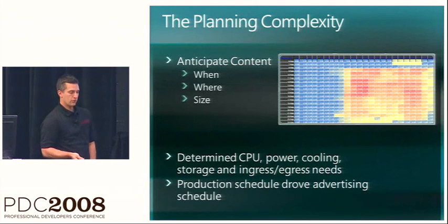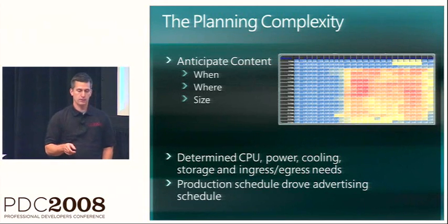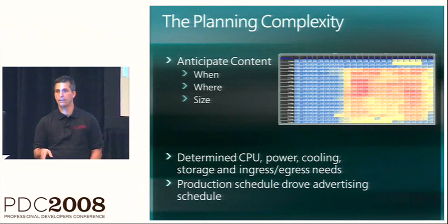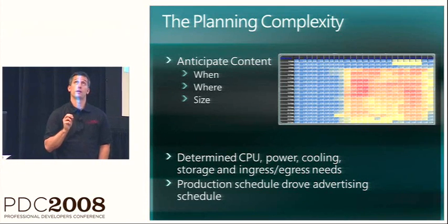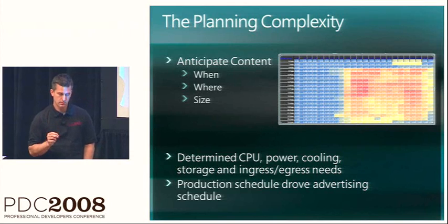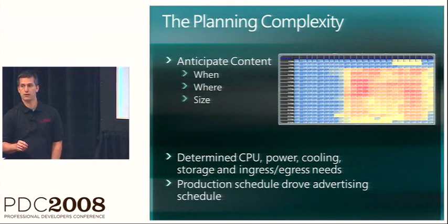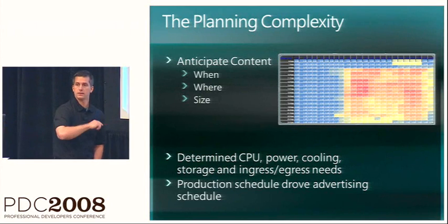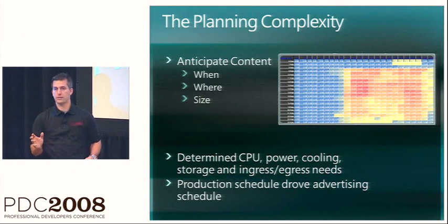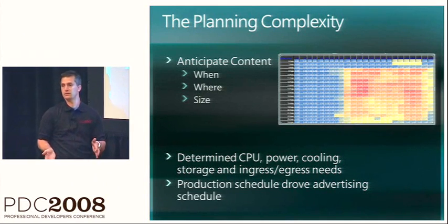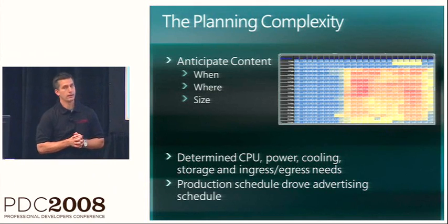They built out their encoder infrastructure. They modeled it, and they realized that with the current CPU power, so that was in March, whenever they did this, in March, the current CPU power, they could not get enough encoding horsepower to hit the entire schedule. They could not, because they didn't have enough rack space to put in any more machines. So they kind of held off.